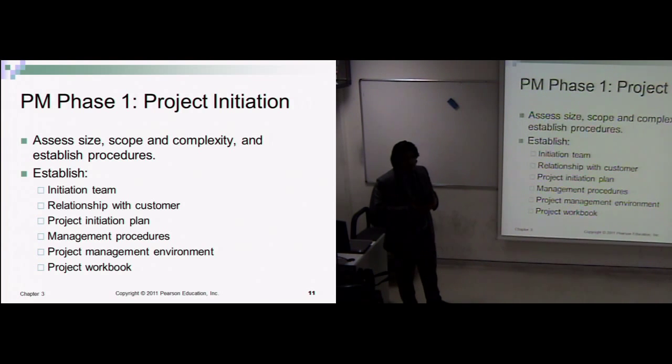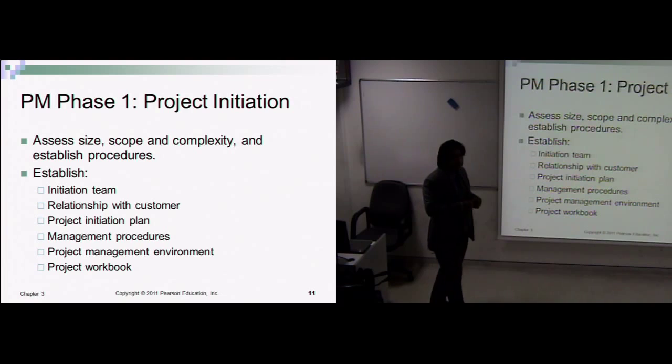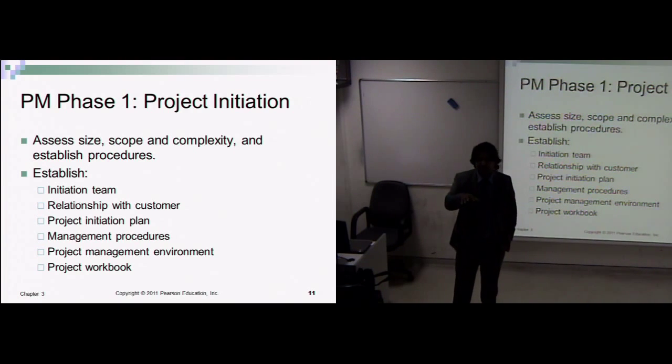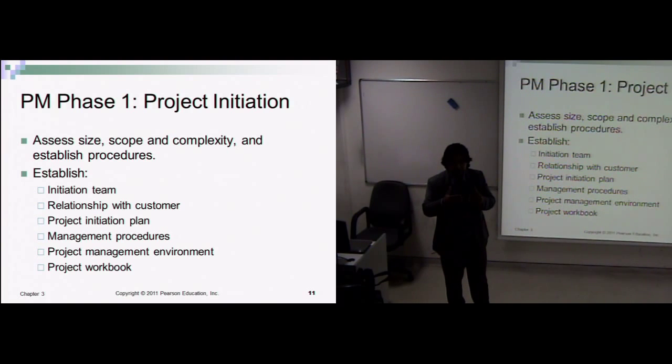Thirdly, the project initiation plan. In the plan we define the activities. Until now the project has just started. When the project is started, we need to define the activities involved, right? These are interrelated activities. This will define when the analysis phase starts and when it will end.